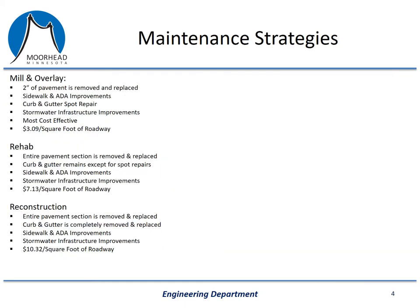Before I go into more depth on the pavement condition index, I'd like to explain the three major types of projects that we typically perform. These are what we refer to as a mill and overlay, a rehab, and a reconstruction. A mill and overlay is the simplest of the three. During a mill and overlay, we remove the top couple inches of pavement using a milling machine and then we put down a couple inches of new bituminous or asphalt pavement. We are also required by law to update sidewalk and pedestrian ramps at intersections to make them ADA compliant, and we will replace certain sections of curb and gutter if it isn't draining or is significantly damaged. A mill and overlay is the most cost-effective project we have, and on average will cost a little over $3 per square foot of roadway.